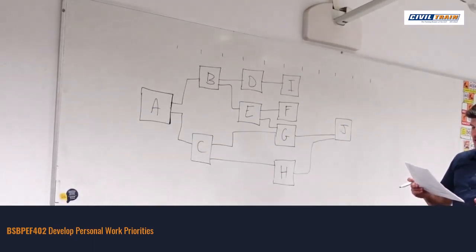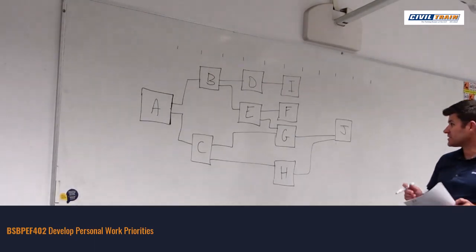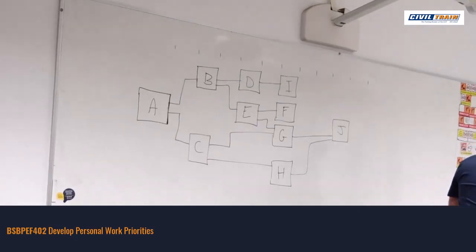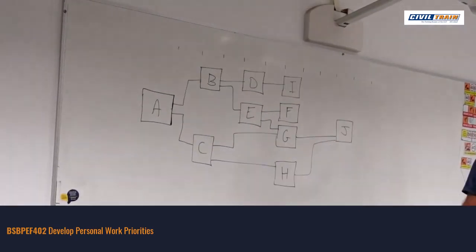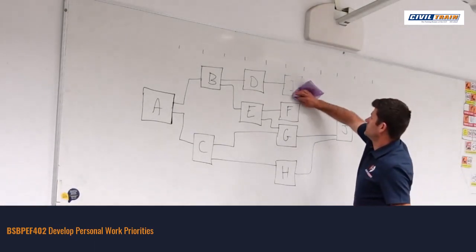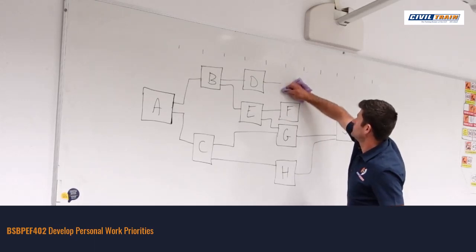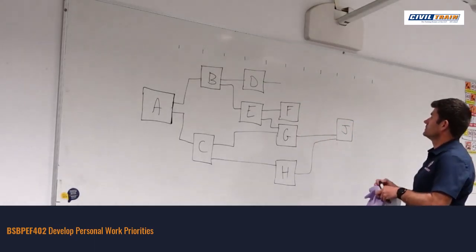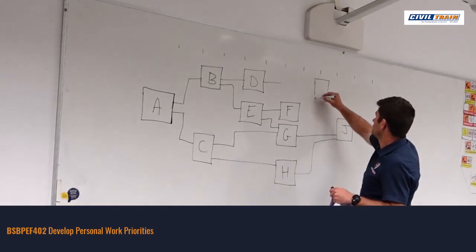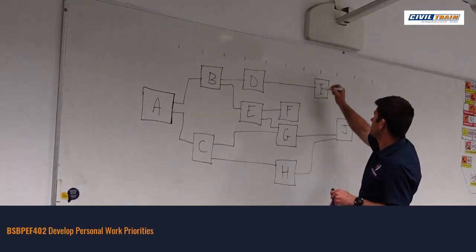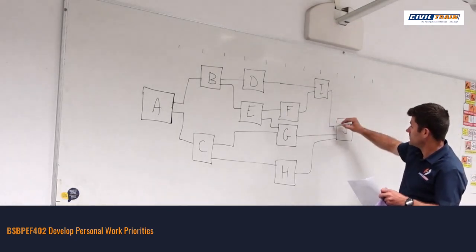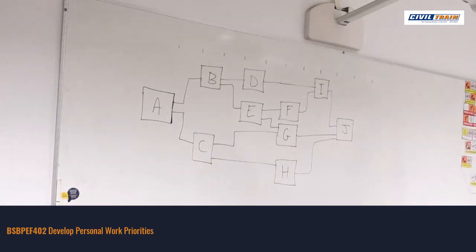I follows F and finishes before J. So what that shows me is, if I follows F, I've got to move I, because it's after F. Still keep that dependency. And finishes before J. So I should have everything linked now.